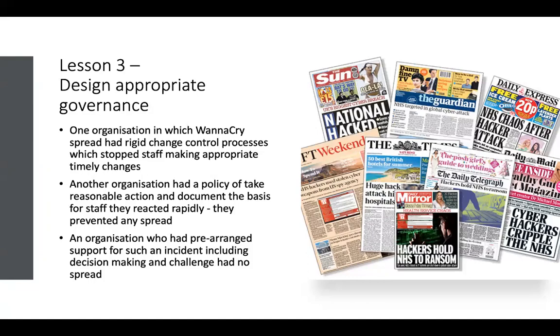Now, one of the organizations, again, that I went into and did a lessons learned had a very, very prescriptive change process. And that change process listed the people that were allowed to make changes. And they weren't able to make any changes without a full change advisory board meeting. And they had to wait. And in that time, the virus or Wannacry malware spread across their computer systems, and they had a significant number of devices with it on.